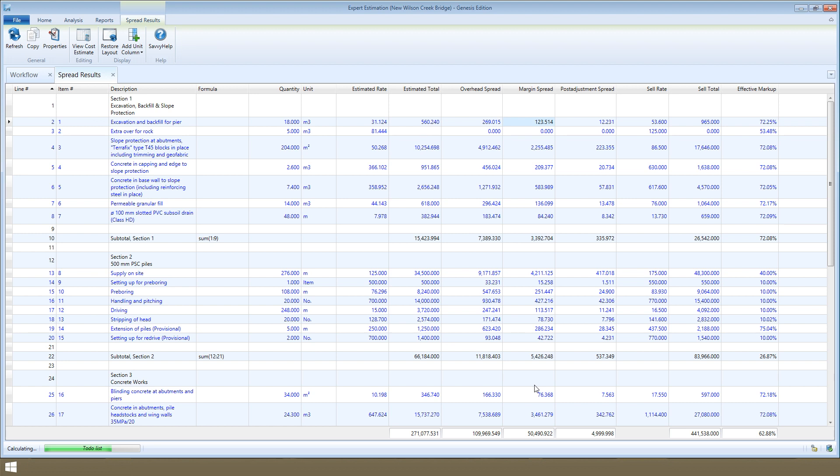You can see the total overhead and margin spread here at the bottom of the window. These amounts will agree back to the totals in the project summary window. The final columns show the sell rates and sell totals of the items and the effective markup. Put another way, the spread results window shows you exactly how the sell rates and sell totals have been arrived at.